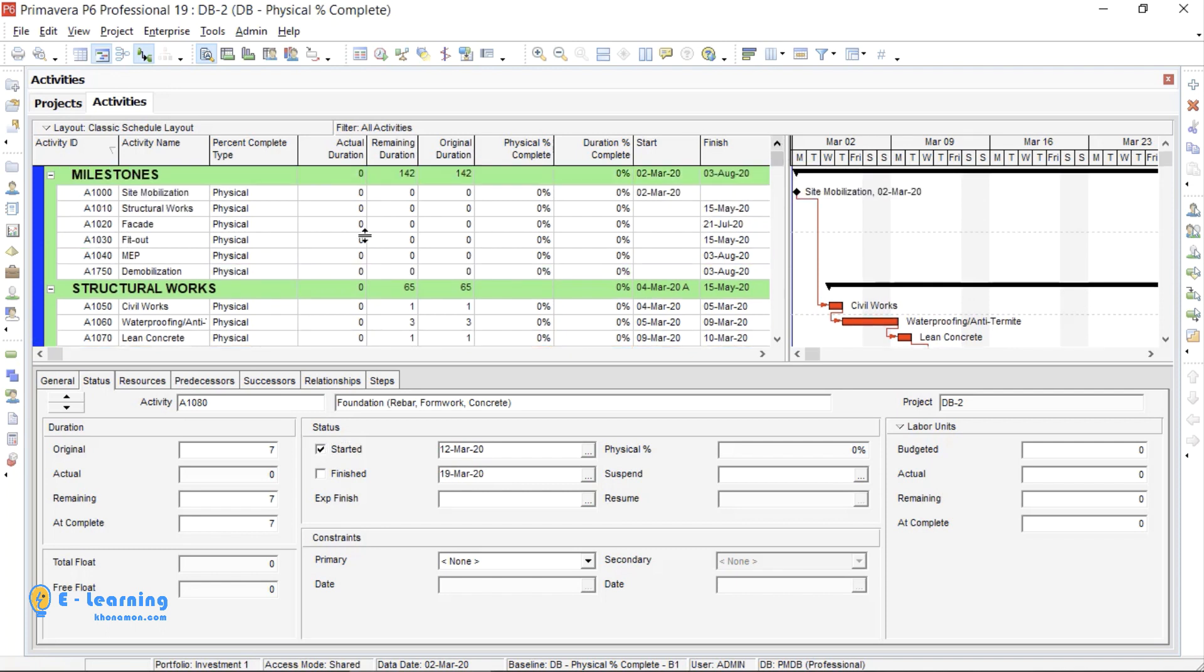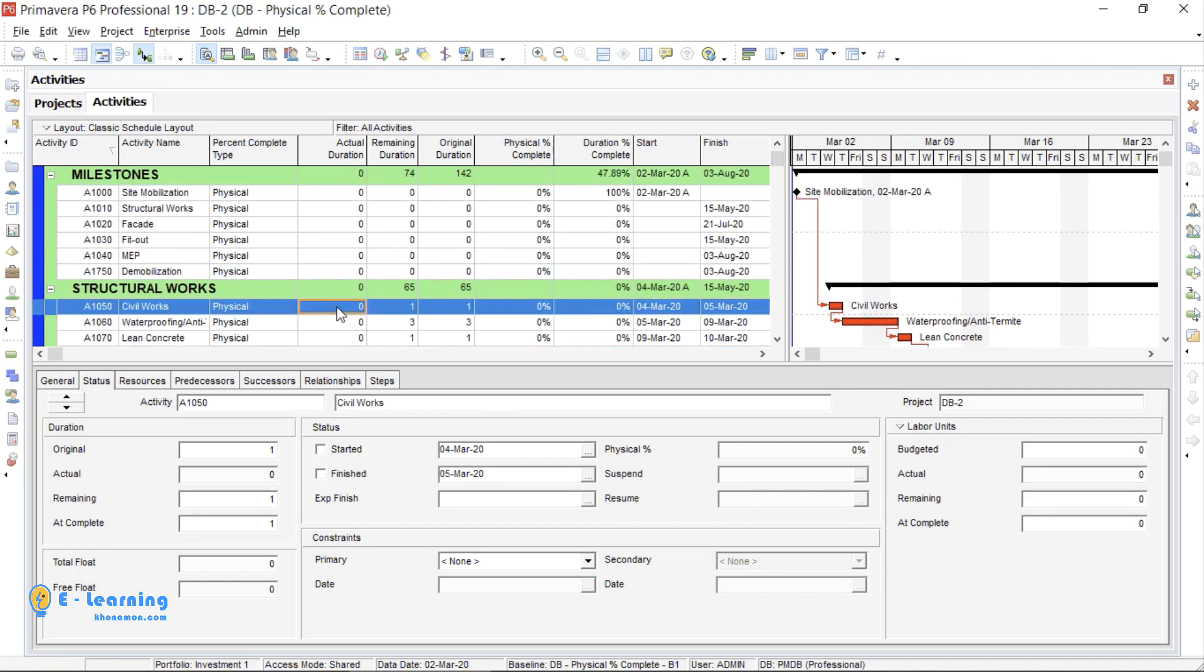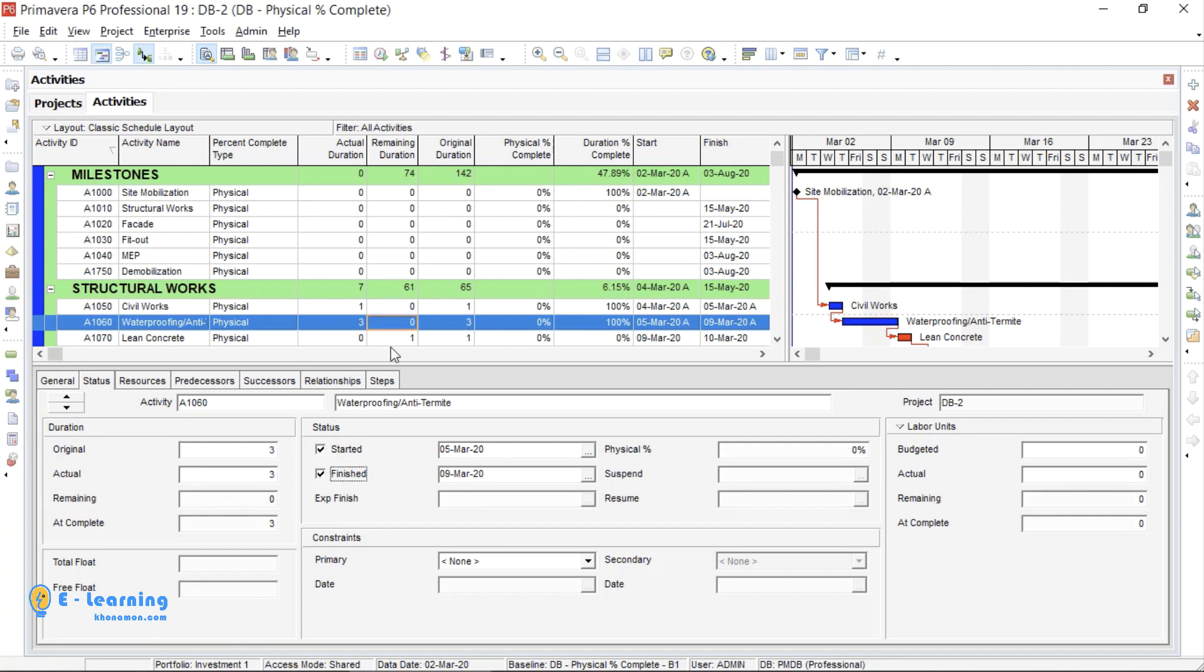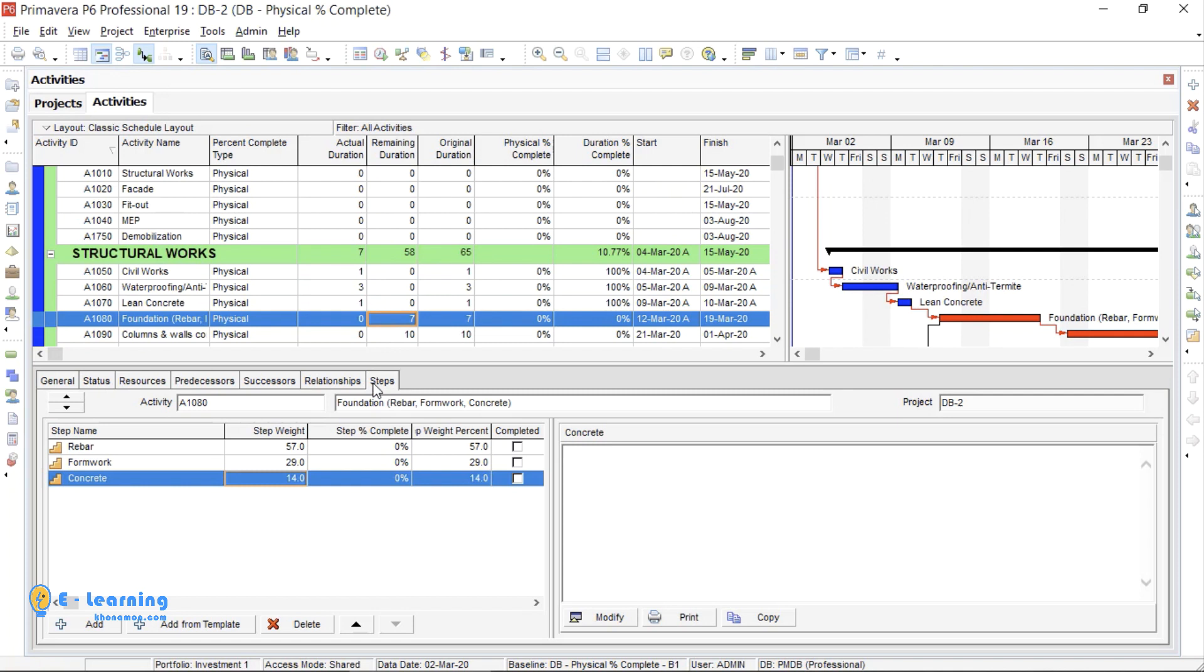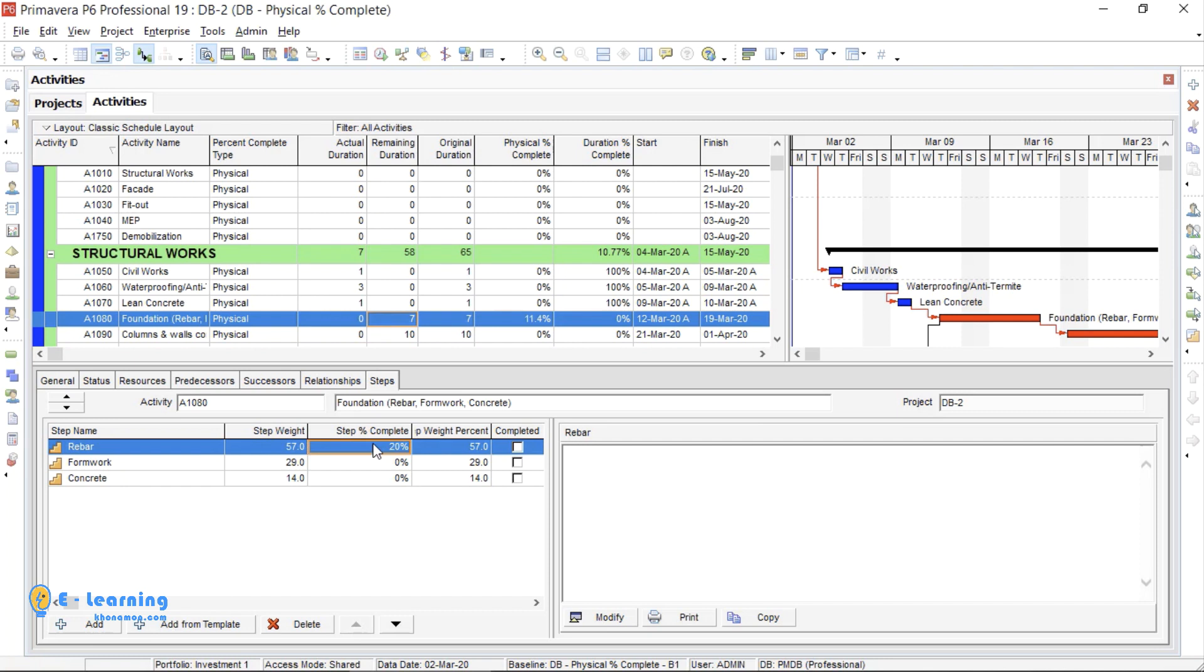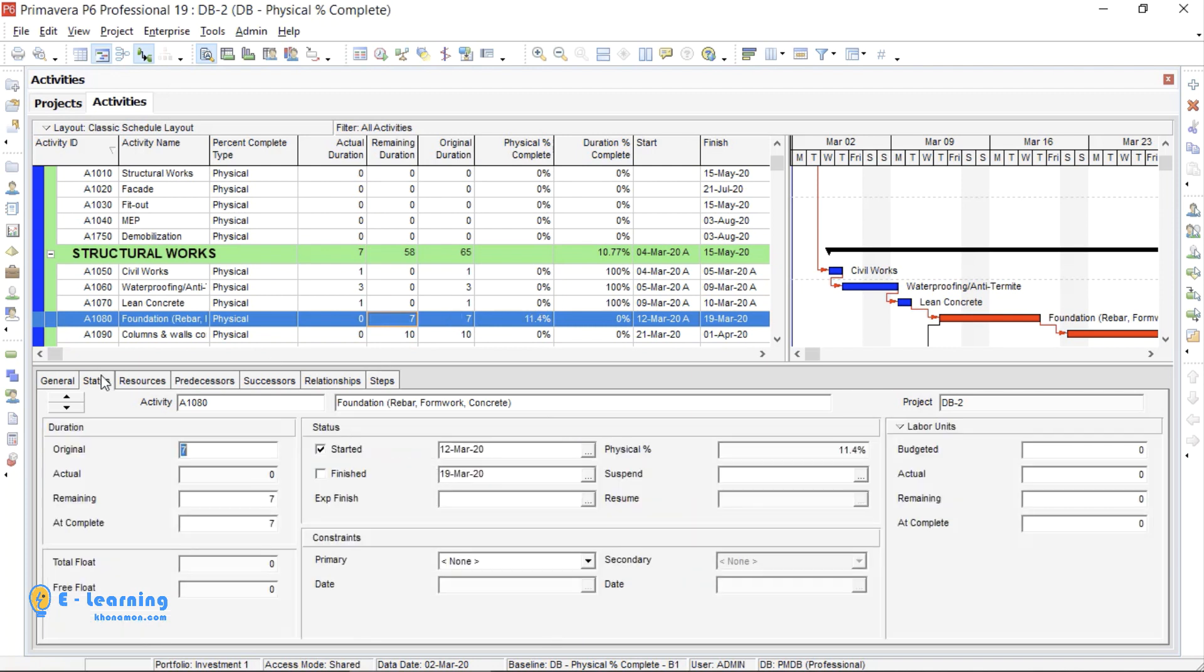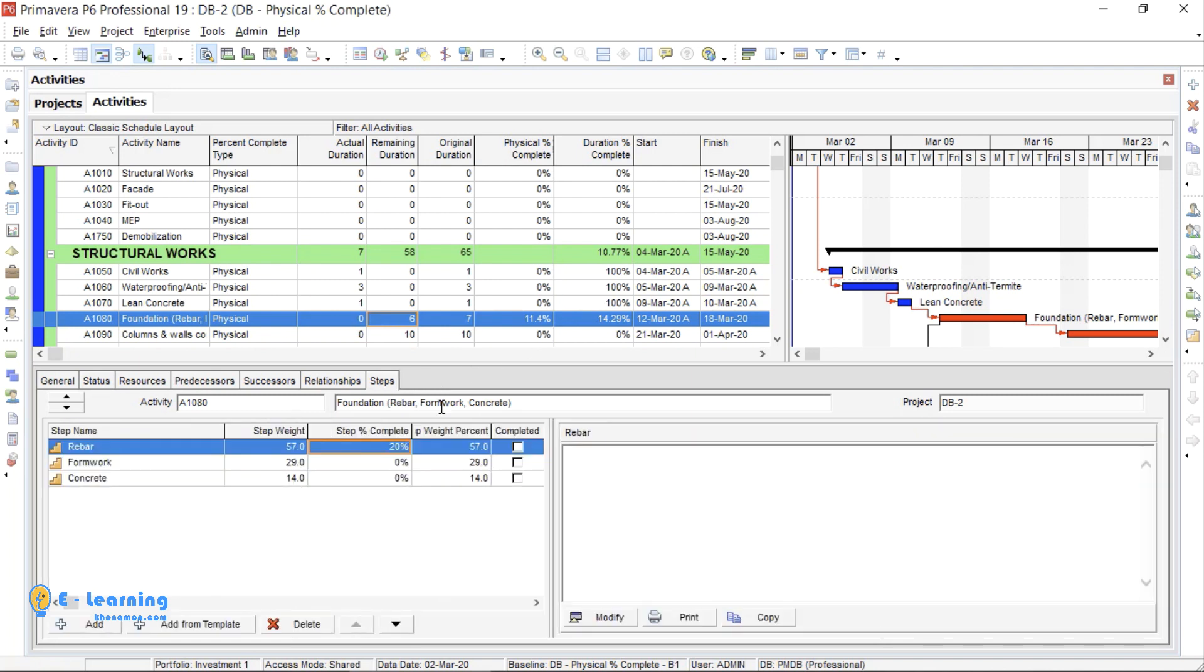I will start them one by one. From Status tab, I will check the start and finish boxes. When I define 20% in a Step Percent Complete column, you will see the change in the Physical Percent Complete column. Go to Status. From Remaining, you must calculate how many days are remained. Here, 6 days is left. So, you see Physical Percent Complete percentage. Or, when it is finished, you can check it as completed. When you check it as completed, Physical Percent Complete column is changed into 57%. It is the percentage of Rebar step weight.